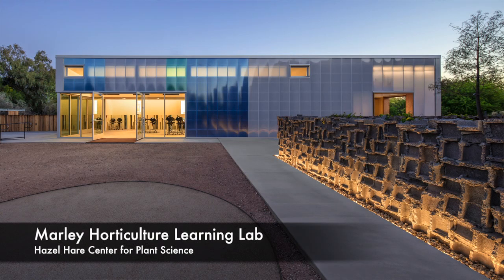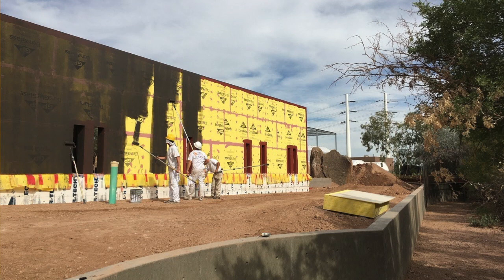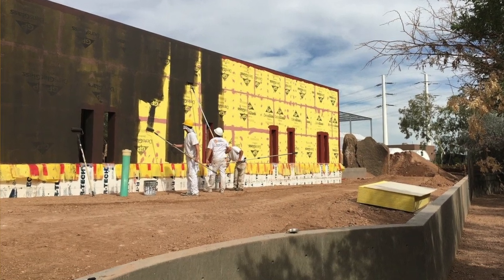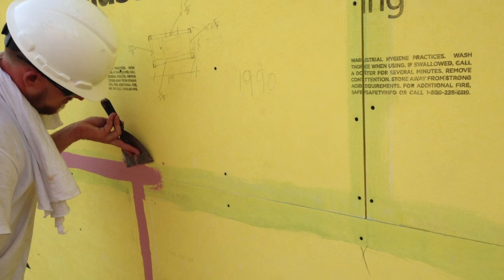One of the key components to the sustainability was really the waterproofing and air membrane on the Learning Center. Having gone through a project with Valley Homes on the liquid applied membranes, we had experience with Donnie Fargo at Fargo Painting to actually install this membrane. My name is Donnie Fargo. I'm the president of Fargo Painting. We utilized a Persoco system on the outside of the building, which is a waterproof air barrier system. There's no failure point. It's a 100% consistent wrap of the envelope all the way through the RO. So it's kind of cutting edge, and it's a great idea.